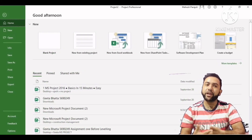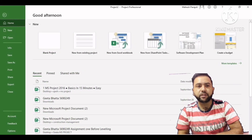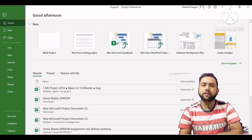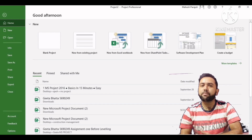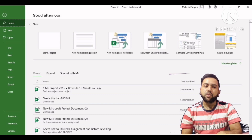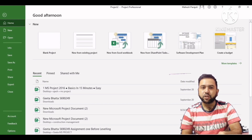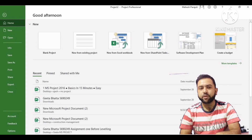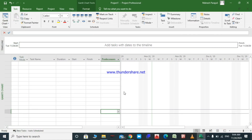In this video we will create a schedule for a new project. The first thing to do is to set our calendar. There are a few different ways to set the calendar in Microsoft Project. These settings should match with each other, otherwise we may encounter some problems. We will see what happens if the settings do not match with each other in future lectures.